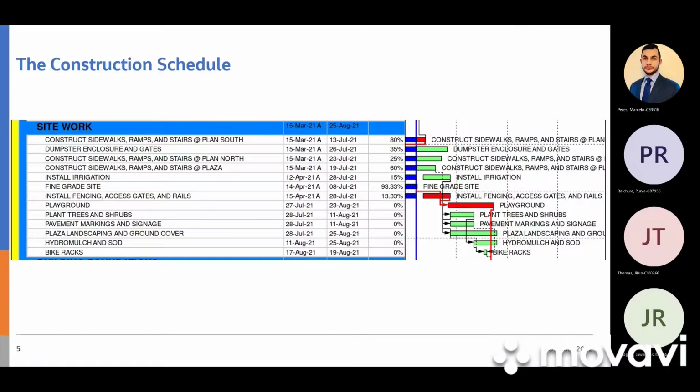What the GC does is he lists every activity that will occur during the duration of the project. And then this schedule will also be used and updated sometimes on a daily basis, preferably on a daily basis. This is the GC telling himself and telling us how well or how bad he's doing out there. And a schedule can get pretty large depending on the size of the project, right? A $20 million project could have up to 100 pages. A $50 million project could have well over 500 pages on a schedule. The GC is listing literally all the activities.